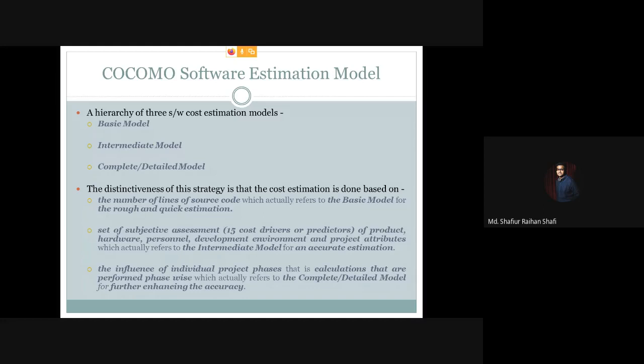Basically, what is the hierarchy? At first, the cost estimation is done based on the number of lines of source code, which is KLOC or KDLOC — that refers to the basic model. The basic model is based on the software size in KLOC or KDLOC, and provides a rough and quick estimation.